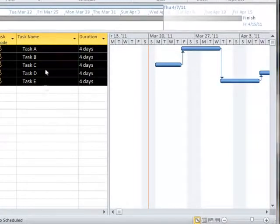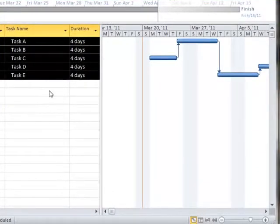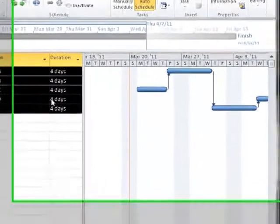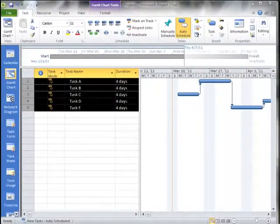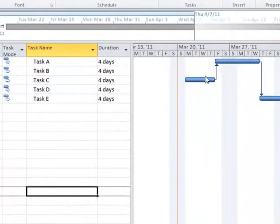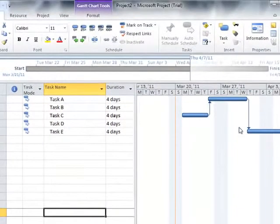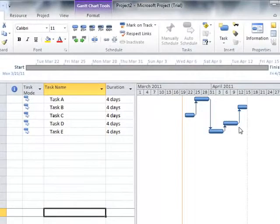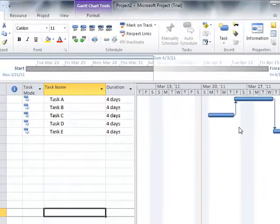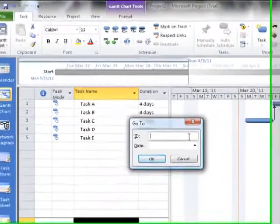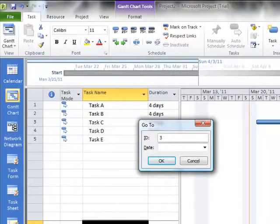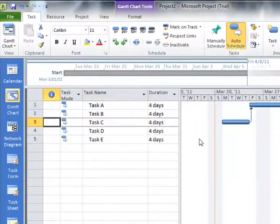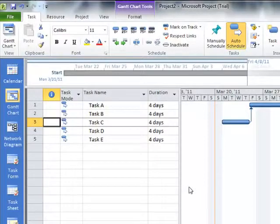Whether we've linked them automatically like this or by putting in predecessor information into the individual tasks, we can unlink them en masse using that Unlink button. I can hold down the Shift key and use my scroll wheel to zoom in or zoom out. You can also do a Control G, and it will allow you to go to a particular task ID. So if I want to go to Task C, I can simply select 3, and it will scroll me down. That's a useful shortcut, especially when we get into very large projects.